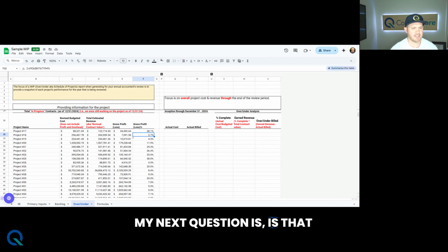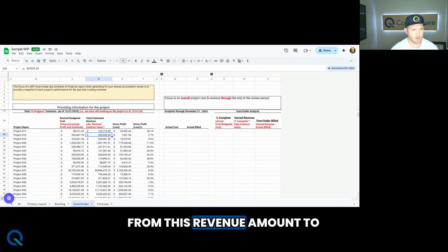My next question is, is that really what we're tracking for, or are there possibly some changes that have not yet been booked? Hopefully the explanation for this particular project is that I have some prime contract change orders that haven't been approved or booked, or maybe something is missing from this revenue amount to help me feel better about the fact that right now I'm tracking for only 2.7% profitability. And this is without any kind of overhead burden or labor burden, whatever you want to call it. Or maybe it's possible that my budgeted costs are being overstated. So I would want to go look at that.